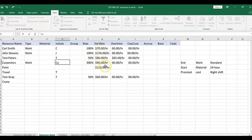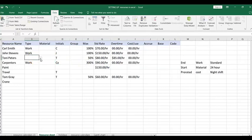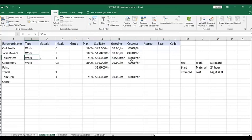Standard rate is the rate you are going to pay per hour, per week, or per month. Overtime applies if the person is entitled to overtime — Tony Peters is entitled to overtime and you enter a rate for that person. Cost per use: you can have a cost per use for persons. For instance, if someone charges an extra amount when they have to come out — like a doctor who has one fee for an office visit and another if he comes to your premises. But cost per use is normally for equipment — bringing a crane onto your property may require a transportation cost in addition to the normal rate.